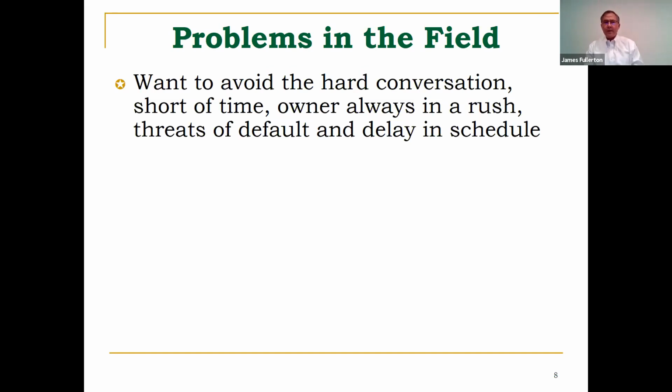But this is a really important juncture, I think, where I need to emphasize what you need to do and what you don't need to do. You do not need to get in an argument. There's no reason you have to have an argument about this. What matters is you provide written notice that this is going to cost extra money or it is going to impact the schedule. And yes, if this was a live seminar, somebody'd be asking right now whether an email is a writing, and the answer is yes. Email is a writing, same as a letter.